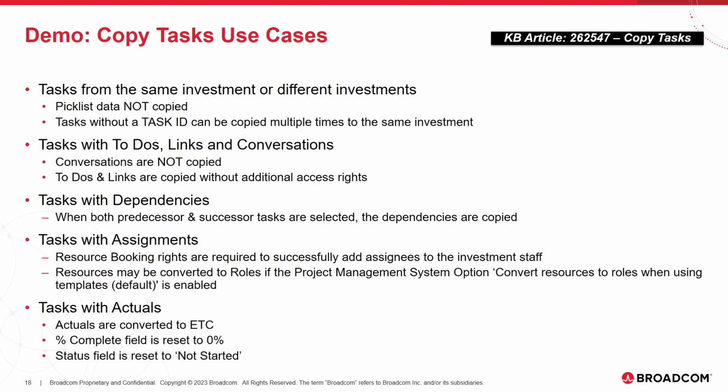Tasks can be copied from the same investment or other investments. If a task ID is present, it can only be copied once if there is not already a task with the same ID in my investment. Conversations are not copied. To-dos and links are copied without additional access rights. When both predecessor and successor tasks are selected, the dependencies are copied.